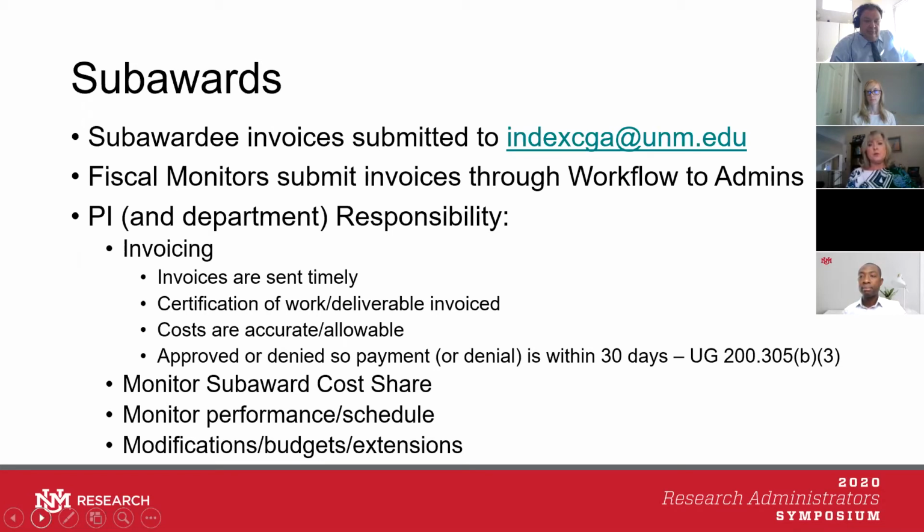It also is important for the PIs to work with the subawardees to make sure that they invoice timely. Kwaku will discuss a little bit about that in the future slides. It is the PI's responsibility to monitor the subaward if they have a cost share and to monitor their performance and their schedule. If there are any modifications or budgets or extensions that need to happen regarding their subawardee, then they have to prompt that through OSP.